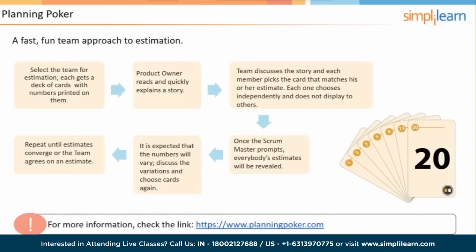And when we got our day going, we started with a planning poker exercise. And so, we used all of the team members. So we selected the team. The product owner was there to answer any questions. The team discussed each of the story cards and then decided what their vote was going to be. And then everybody voted at once. If there were outliers, they were discussed. And the reasons for those variances, those outliers, were then part of the discussion. And then we did another round of voting. And we would keep doing that until our estimates converged or we reached consensus on them.